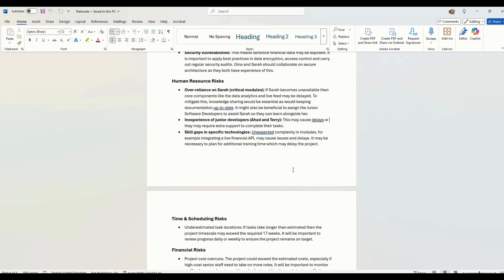Human resource risks. So human risks. Over-reliance on Sarah for the critical modules. If Sarah becomes unavailable, if she suddenly goes off sick, then we've got a problem because key components like the data analytics and live feed might be delayed because she's the only person who can actually do that.